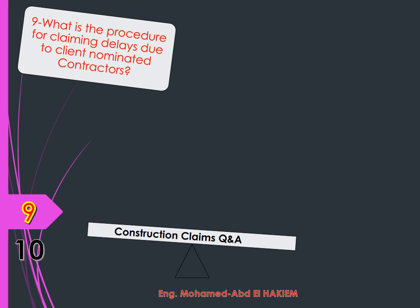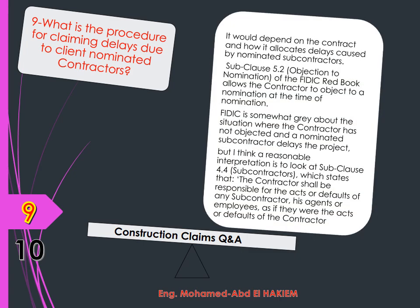Question 9: What is the procedure for claiming delays due to client-nominated contractors? Answer: It would depend on the contract and how it allocates delays caused by nominated subcontractors. Sub-clause 5.2 Objection to Nomination of the FIDIC Red Book allows the contractor to object to a nomination at the time of nomination.